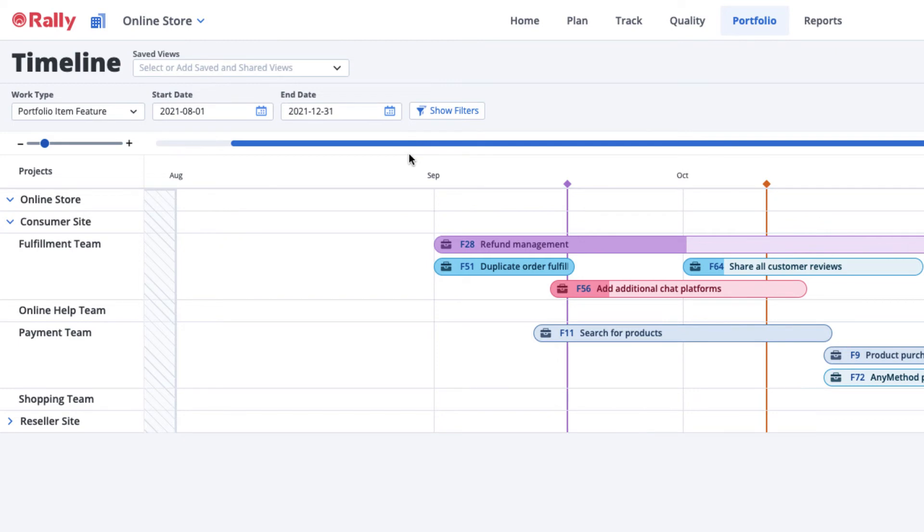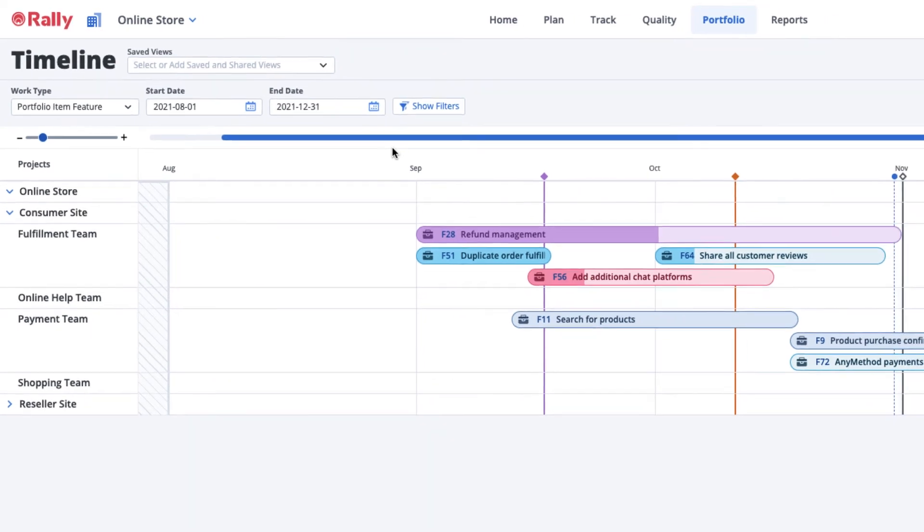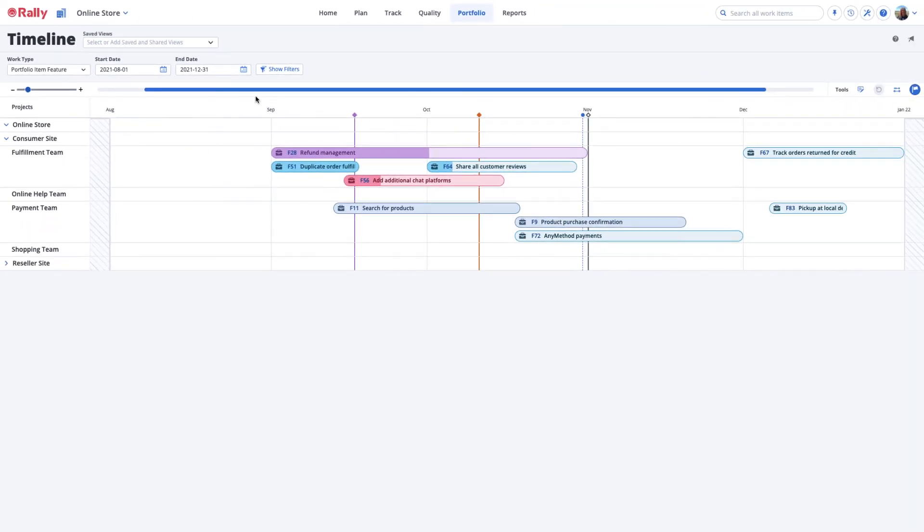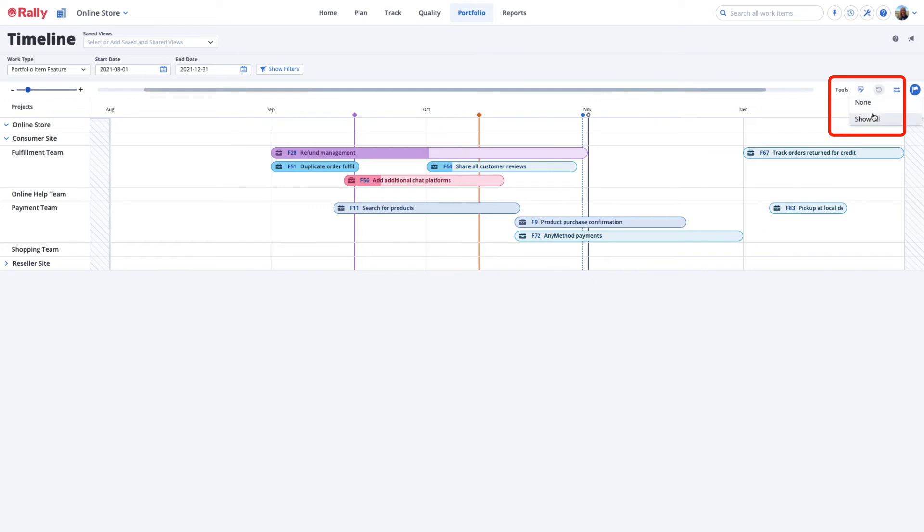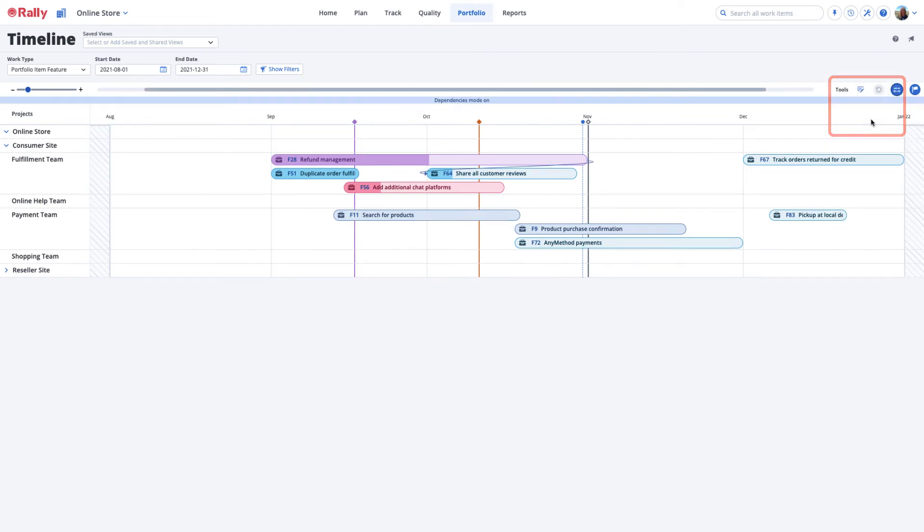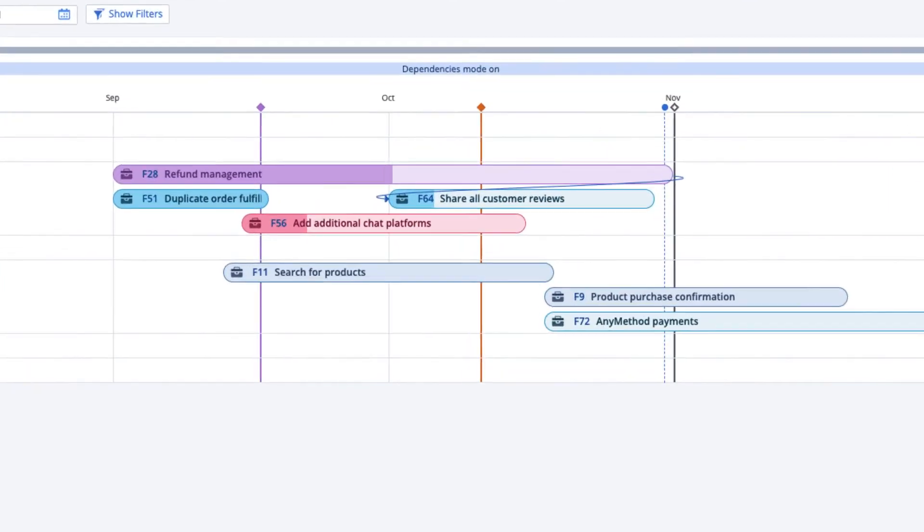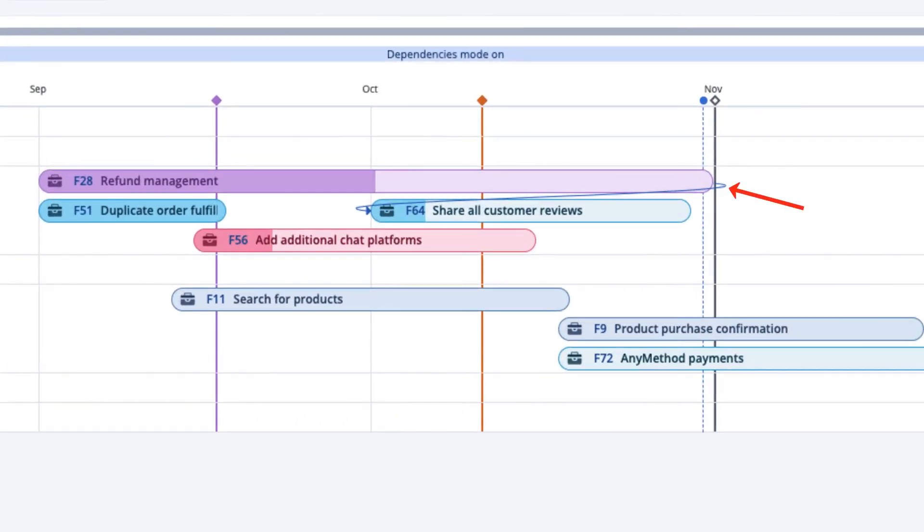You can also use the timeline to show dependencies among Portfolio Items and Teams. Select the Dependencies icon in the Tools section and then select Show All. You'll see the arrowed line showing the predecessor and successor relationships between features.